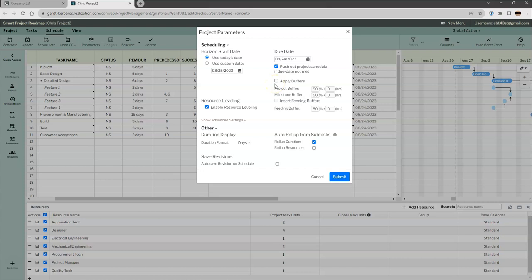I'm just really interested in the duration, the overall cycle time of the project plan, and how the resources are applied. So I'm going to leave on enable resource leveling right now. What that does is down here all the resources are selected to level or to stagger on. I don't need to stagger on all resources.